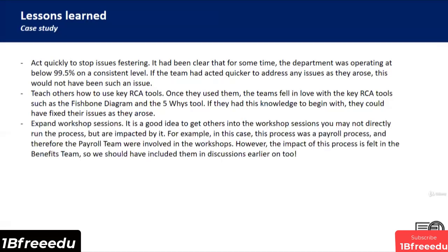And finally, expand your workshop sessions. So it's a good idea to get others into the workshop sessions that may not directly run the process, but are impacted by it. So for example, in the case I've just given, this process was a payroll process, and therefore the payroll team were involved in the workshops. However, the impact of this process is felt in the benefits team. So we should have included some benefits team members in those discussions earlier on too.